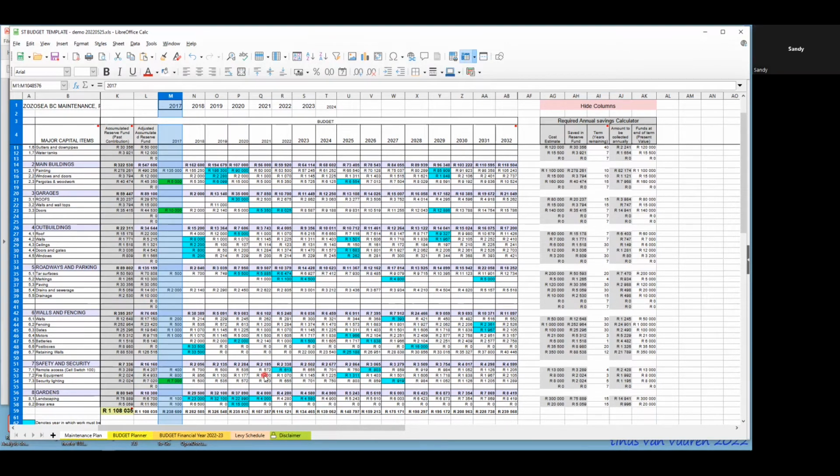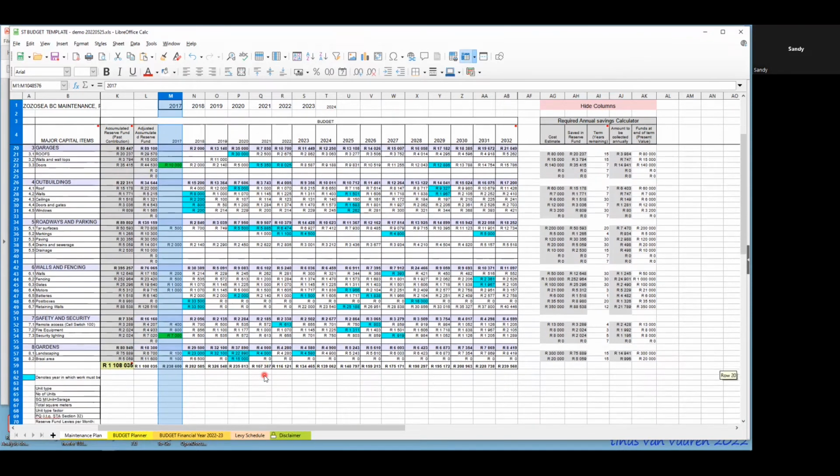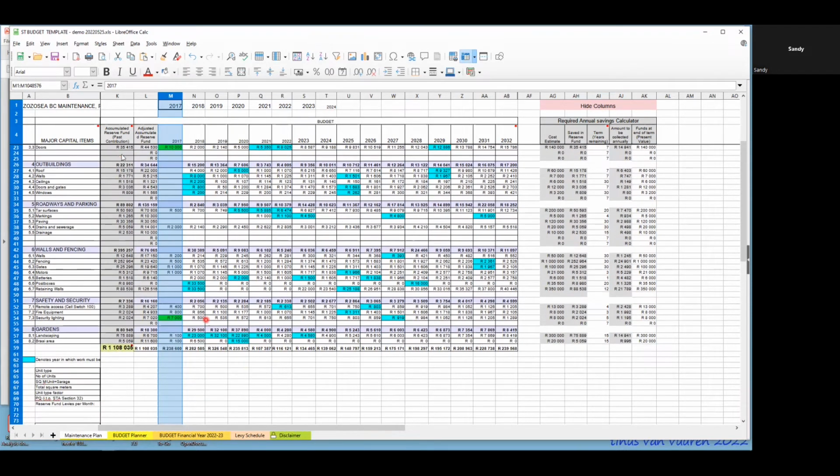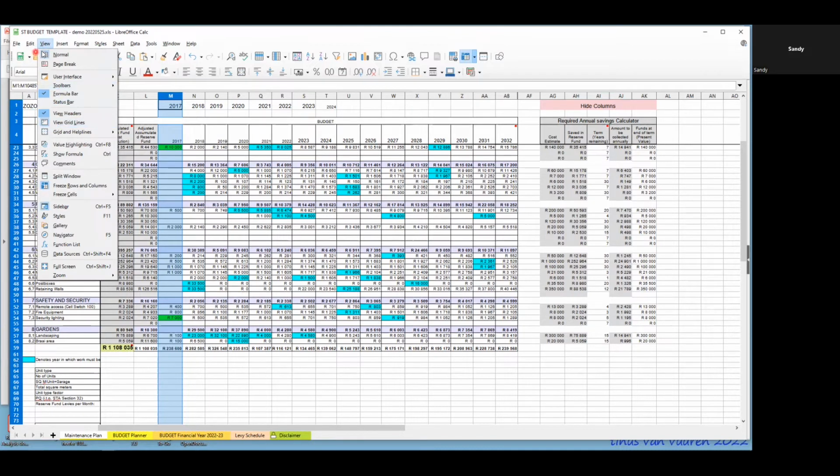On your escalation, are you working per annum at about 8%? It is 7%. Taking in the factor now that costs, because of the situation in Russia and the COVID, raw materials that we are not getting, or we're sending it out, raw material costs in the last 6 months have escalated by as much as 25 to 30%.